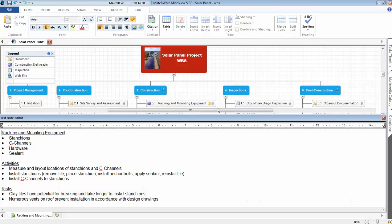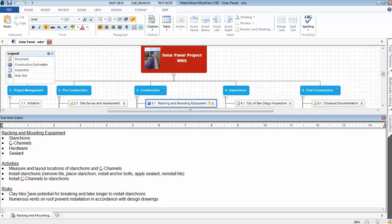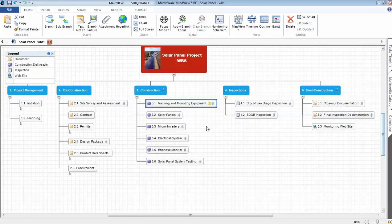Under racking and mounting, this is the system that's used to hold the solar panels in place on the roof. And that included some stanchions, some C-channels, hardware and sealant. I included my activities. And then for risk, if the tiles break during installation, you need to get some new tiles. It may take longer to install the stanchions if the roof has the curvy type clay tiles. If there are numerous vents on the roof, it could prevent installation in accordance with the design drawings. It could take a little bit longer to install the solar panels.